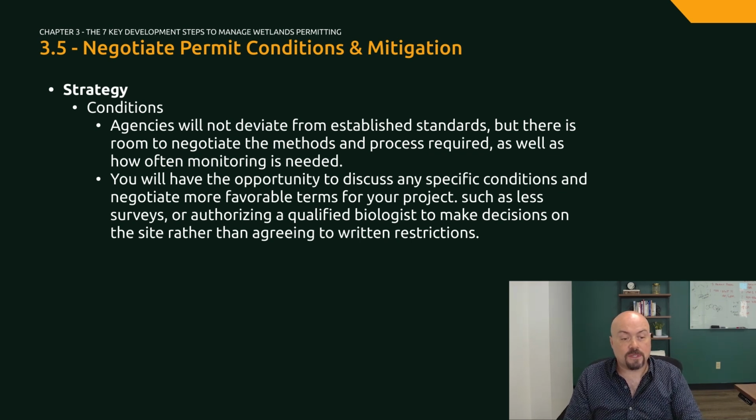You will have the opportunity to discuss any specific conditions and negotiate more favorable terms for your project, such as fewer surveys or authorizing a qualified biologist to make decisions on the site rather than agreeing to written restrictions.